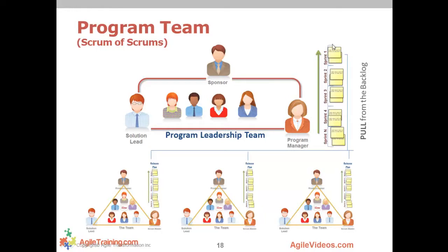They realize that they have a backlog, they probably have a program management wall themselves. They have to have daily stand-up meetings with this team, or potentially have some teams that don't do it every day, program teams that do it maybe 3 times per week. They bring the members of these teams together in combined demos, combined retrospectives. This team's really looking at the dependencies between these teams, integration points, when should all this work come together to be integrated. So they're really managing the program.